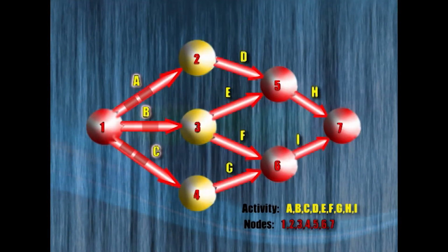For example, he wants to, let's say, purchase technology. He wants to tie up with someone, go into a collaboration with some partner. Now, such activities are not strictly dependent on his acquisition of land. So we can say that these can be called concurrent activities that can be undertaken along with certain other activities parallelly. There is no direct interference of one activity with the other. So there is a question of concurrent activities. Which are those activities that can run concurrently? So he can list down which are the activities that can run concurrently.